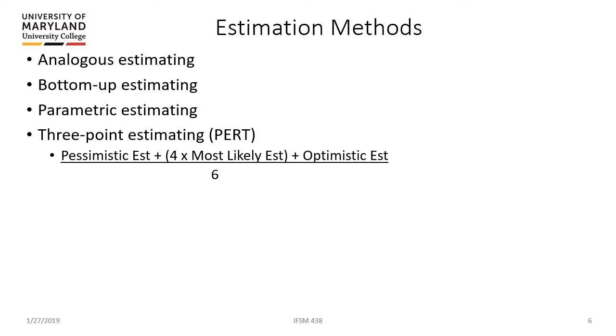Well, if we want to build a road that's 1,000 meters, we could just take that and multiply it by 5. Because if we know what one part costs, and each part is very similar, we could just multiply it out and get your estimate. So that works for things that are easily repeatable.